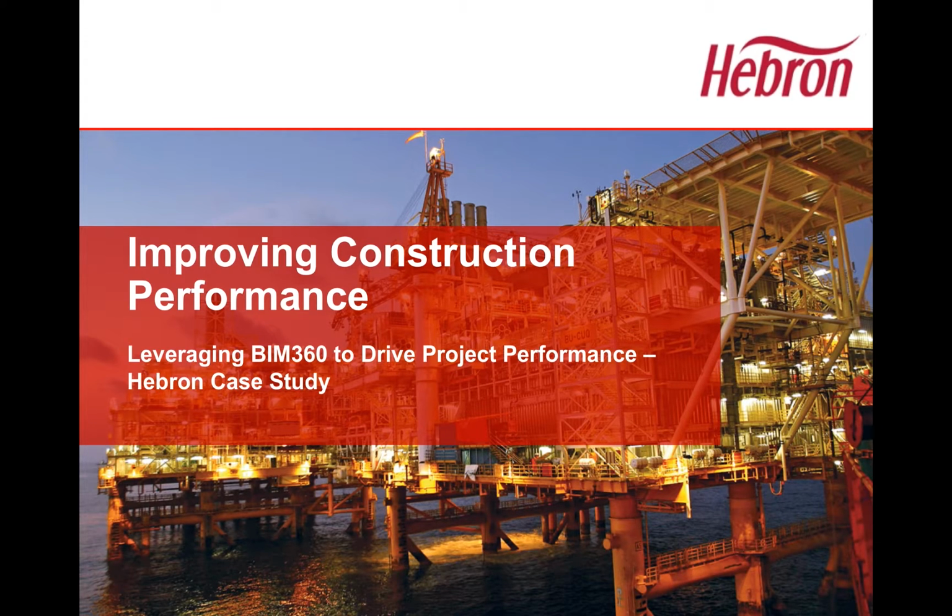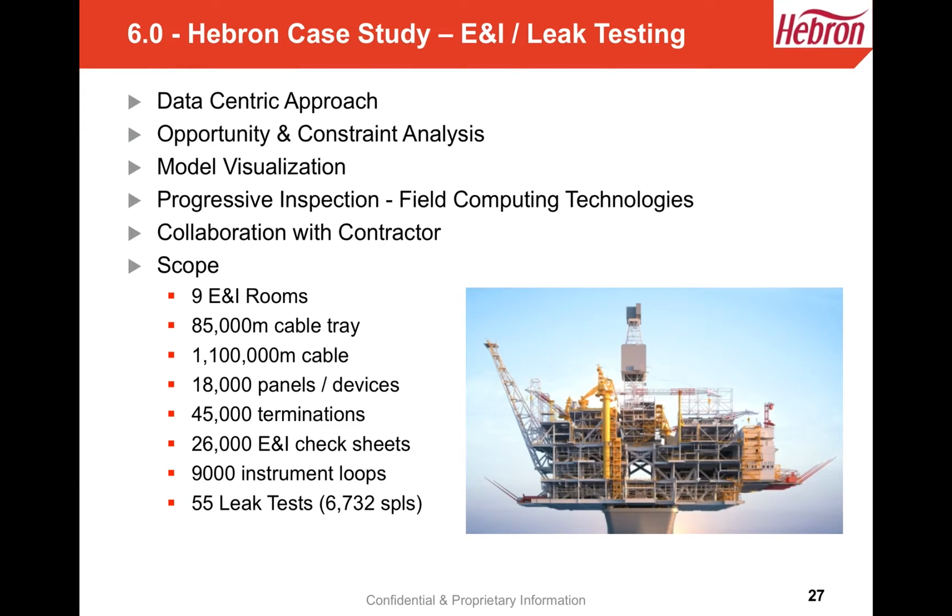So this presentation is going to look at how our project leveraged BIM360 to drive project performance on the project here in South Korea. The way we were set up was from a very data-centric platformed approach. We had all relationships in data cross-referenced, linked back to the plans and actual status. A key component of how we drove execution was through something we call opportunity and constraint analysis, which is all about opening up the work fronts for the next group.